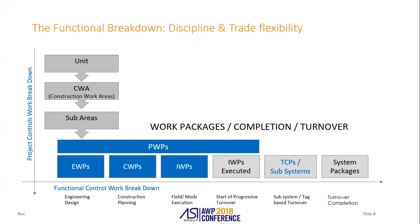As you go down the left-hand side of this representation, you start looking at it from project management — project controls and your work breakdown structure — going from units to a construction work area to sub-areas. What AWP is all about is breaking down that work breakdown into EWPs, CWPs, IWPs, supported by the procurement work packages. Along the bottom you can see it goes functionally through engineering, construction planning, execution, progressive turnover — somewhere along the line you go from bulk construction to turnover by system.